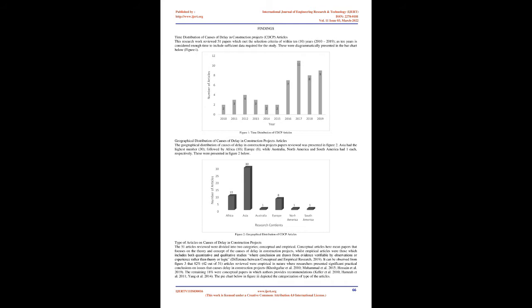2010-2019. References. Brief description of the study. Causes of delay. Kazaz et al., 2012. Conducted a survey on 34 factors affecting project duration of 71 construction companies in Turkey. Outlined the most significant delay factors to include design and materials changes, payments delay, problem of cash flows, poor labor productivity, and contractors' financial problems.